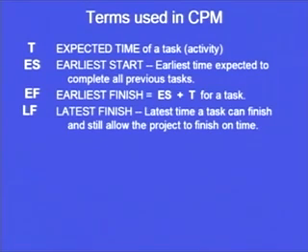Last activity requires 5 days and this activity can only start when certain other activities have been completed. So, what would be the latest finish time for those activities? That is 19 days, because if they finish later than 19, adding 5 more days will not sum up to 24 and the total project may get delayed.